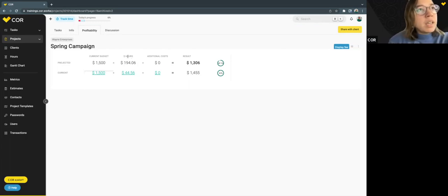So this is what we have here, right? A projected cost, a projected hourly cost. We think that it will cost us $50 for Maca's work in the tasks, right? But what happens if Maca tracks 6 hours of her time because she had to do some adjustments in this particular task, or the resources had to work a little bit more in the tasks that we have created within this project? So this changes. This is no longer $50, it's $100.